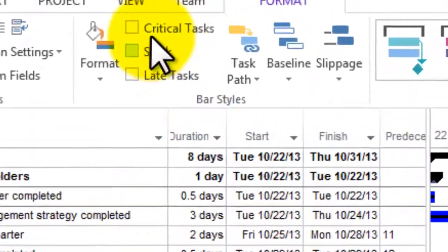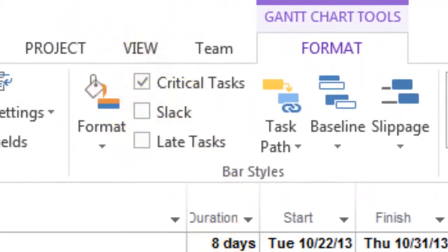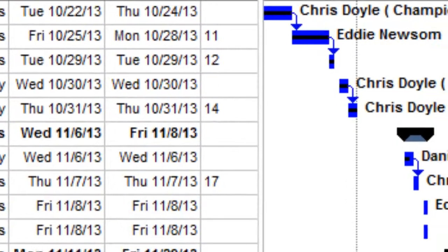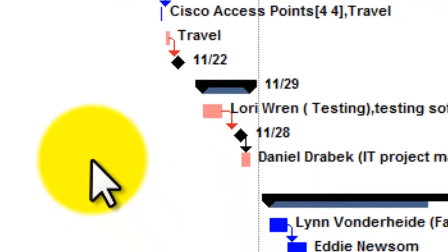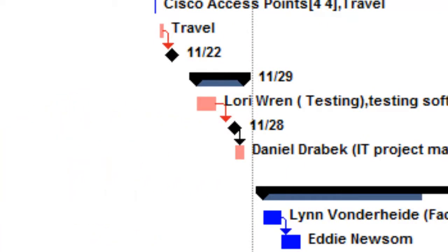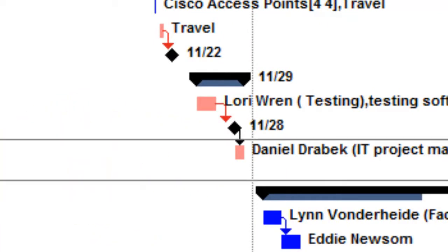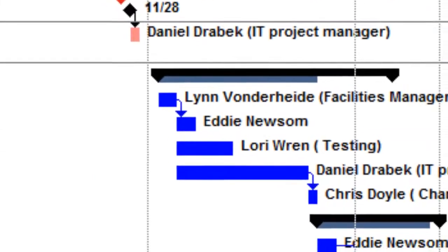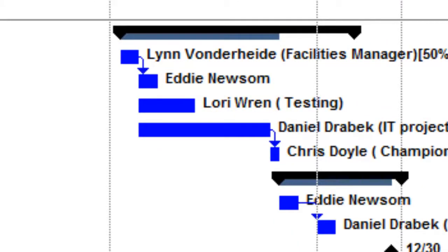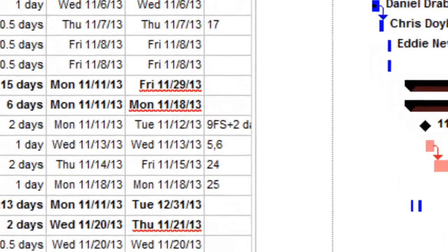I'm going to go back up and click critical path. And when I do that, certain parts of our diagram, our Gantt chart, turn red. Those are part of the critical path. So you'll notice that each one of these, send out results by conference call and email, is part of the critical path. But you'll notice also that none of the monitoring and controlling functions are part of the critical path, as that should be. The other thing mentioned in the definition was the network diagram.